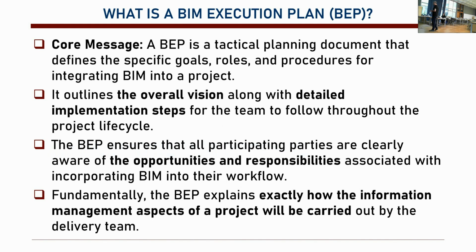So let's start talking about BIM execution plan. It's a planning document, a tactical planning document. We have the specific goals for the project and the roles in the project. Who do we have? For instance, energy analysis. Who is going to do that? We have a consultant for that, maybe. Or maybe we will say that in this project it's not a big deal. We already have a mechanical engineer, and the mechanical engineer already has experience in that. So that role is also on the mechanical engineer.